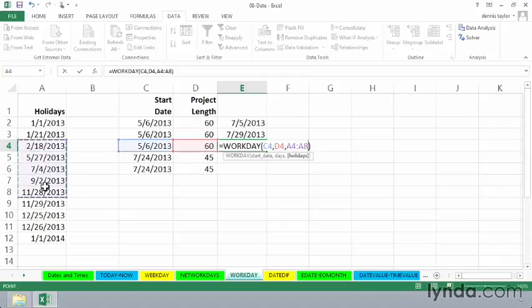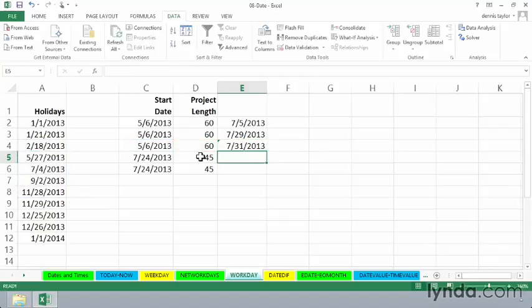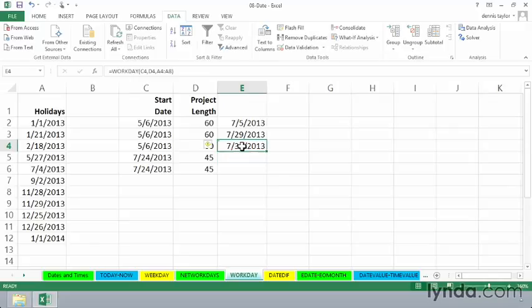It's going to be somewhere in those. Enter. And so the actual project ending date will be the 31st, because we do have a couple of holidays within that time frame.